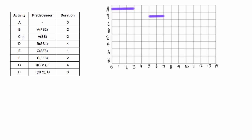Activity C depends on A and it's a start-start relationship, so activity C can start when A starts. There's no lag, so we will start right at zero again, and this one's also two days, so we will just go to day two.